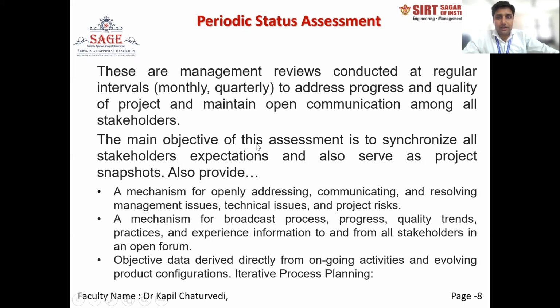These are management reviews conducted at regular intervals, monthly, quarterly. The checkpoint may be monthly or quarterly, or in a small project, weekly, to address progress and quality of the project and maintain open communication among all stakeholders. The main objective of this assessment is to synchronize all stakeholders' expectations, and it also serves as a project snapshot.